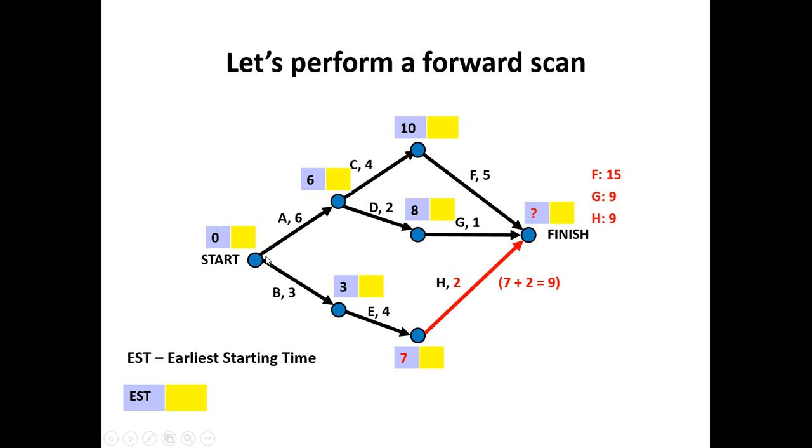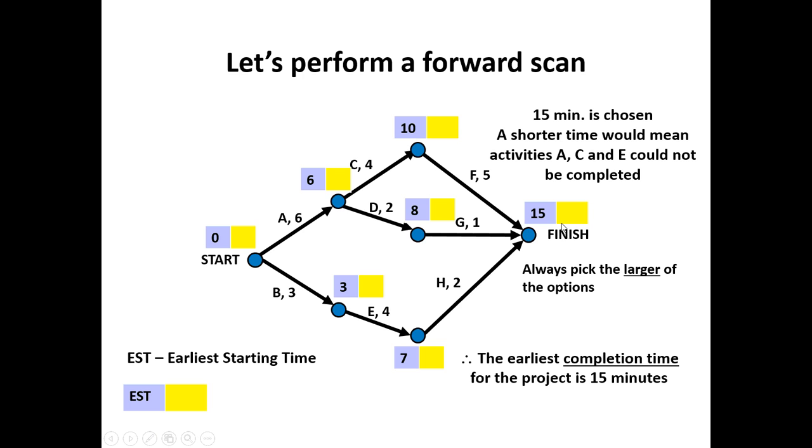Now if I want to enter in nine, that means there's no way I can actually complete activity A, C, and F following this particular sequence. Because the six, four, and the five gives me fifteen minutes. When I have competing activities, I have to take the larger of the numbers. So fifteen minutes is chosen. A shorter time would not allow A, C, and F to be completed.